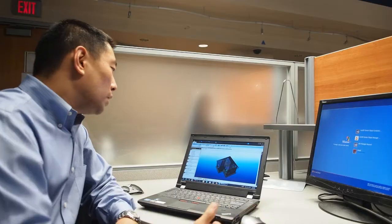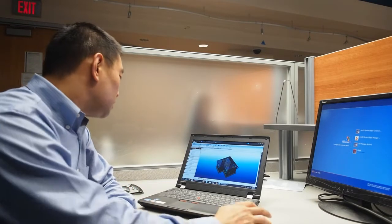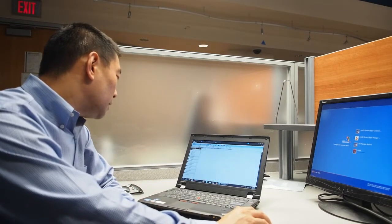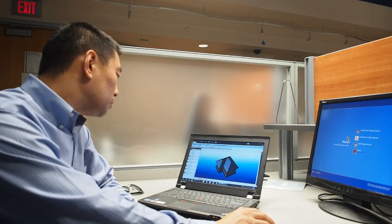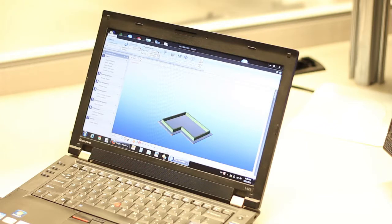I'm showing you this model — this is the model we created in the BIM course, Civil 1299 Special Studies for Building Information Modeling. We use this model to demonstrate the 4D simulation of a small house construction. We can demonstrate the construction sequence using 4D simulation. First we build the foundation slab, the foundation walls — this is the first floor.